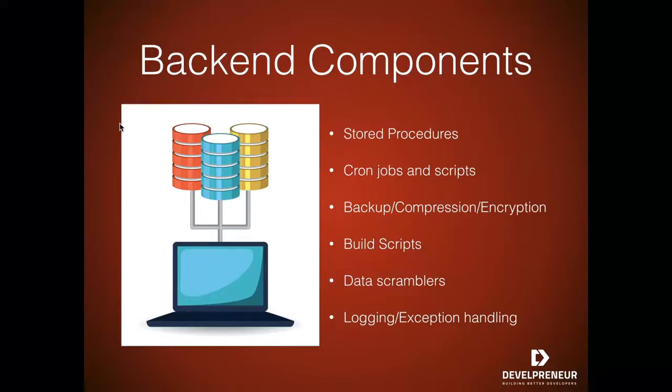You're going to change some folder names. Maybe you change the number of files that you're dealing with or the types of files you're dealing with. But once you've got that basic component together, you can take it from project to project, and it gives you a good way to estimate, because you know that, okay, it took me half a day to do this last time. It's going to take me half a day probably to do this next time, or maybe a little less than that because I learned something the first time through.